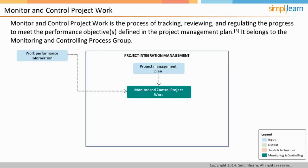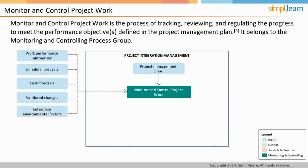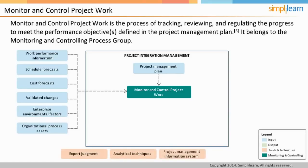Along with the work performance information, forecasts related to cost and time form important inputs upon which the project manager has to act. Validated changes confirm that approved changes have been appropriately incorporated. Enterprise environmental factors and organizational process assets are also inputs. Expert judgment, analytical techniques, project management information system, and meetings are the various tools and techniques. One of the outputs of this process area is change requests, which could be in the nature of corrective and preventive actions or defect repair.